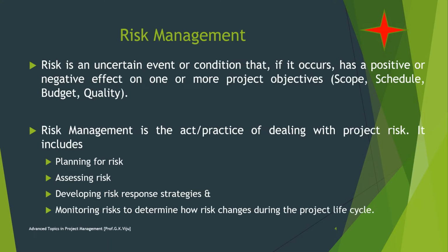So a risk can be termed as any uncertain event or condition that might affect your project. Not all risks are negative. Some events like finding an easier way to do an activity, or conditions like lower prices for certain materials, can help your project. When this happens, we call it an opportunity, but it's still handled just like a risk.